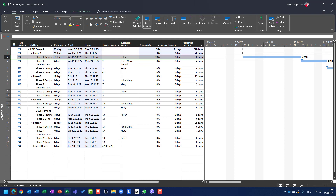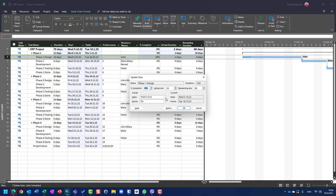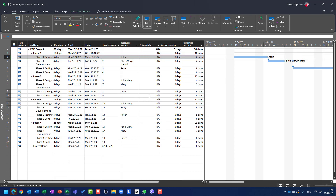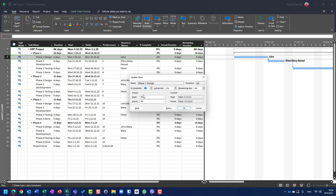If you don't put anything in the start date field, the start date remains the same. So if I put two days actual and eight days remaining without changing the date, it means the task started as it was supposed to — on 3rd of October. But if I enter a different date than the planned 3rd of October, the actual start date will be updated accordingly.